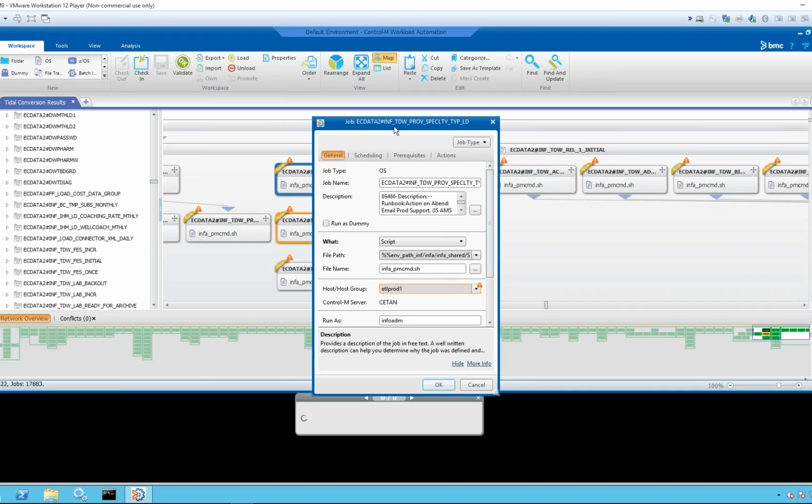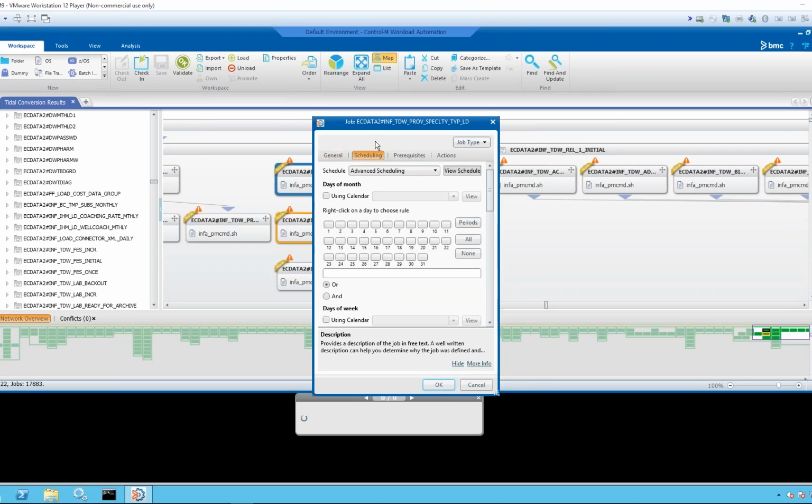So that gives us even more capabilities, so that before we turn on a job and before we actually start to run it, we have the ability to put it through another couple of passes of updates, put it into a parallel test mode, let it parallel test for as long as we want to, and then when it's time to turn it on, we're basically just making one minor update, and then we're decommissioning that workload from the old environment. So it's a nice, gradual, phased approach. And if at any point in time we need to, we can always go back and do further updates or mass changes to the data.